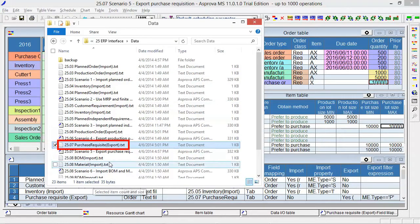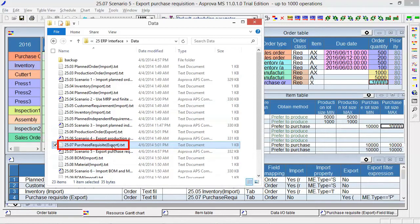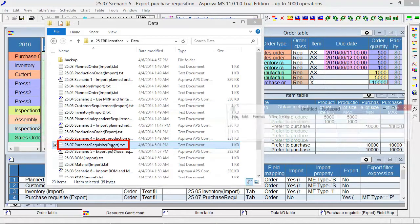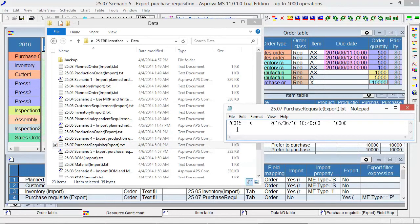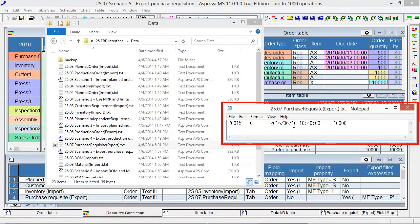The file 25.07 Purchase Requisite Export will be created and the data of the purchase order will be output. It is the plan that will purchase 10,000 items of X at 10:40 on June 10.